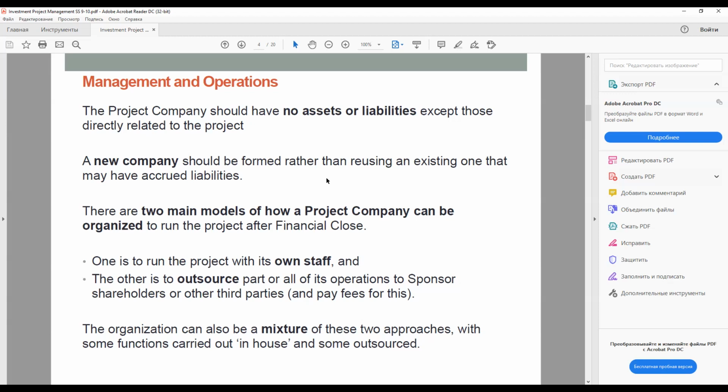That's often the case. If one of the sponsors is to take on any management roles, a management contract will be needed and will ultimately be reviewed and approved by the lenders, setting out the scope and cost for such services. These may include matters such as accounting and tax or personnel management. Sponsors are generally well organized in ensuring that all the engineering and construction management expertise is in place at financial close, but sometimes they neglect the finance side of the project company's organization.